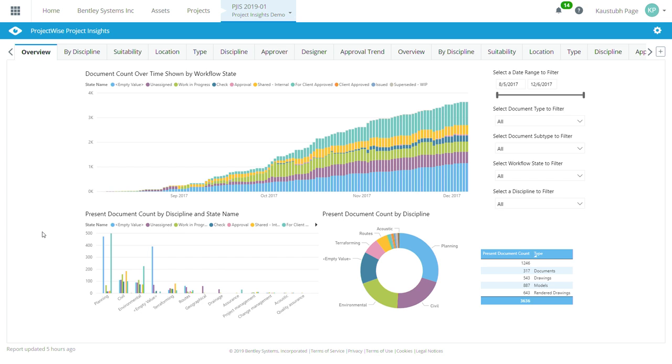So imagine for this building, if I'm changing a layout, I need to make sure it satisfies the fire requirement, it satisfies maybe other safety requirements, it is compliant to the structural integrity of this building and all that stuff. So that's why there's a review process in construction. You cannot just make a change and let it go to construction. And that review process is captured over here.